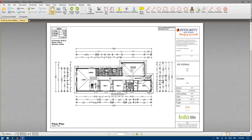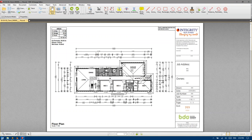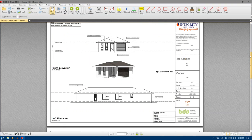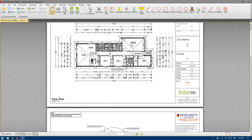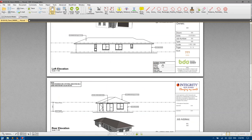The client will do their initial request of changes, we'll turn that into council, submit it to council, and then arrange for them to have a colour selection consultation — completing the colour selection document, which could be quite substantial or very minor changes. We take all the client's requests, the approved variations and the council plans and mark them up into a construction set, which will effectively be the working drawings the home gets built from. We then get the clients to endorse and re-sign the construction set before we go to site, just so there's no lack of clarity about what's actually being provided.